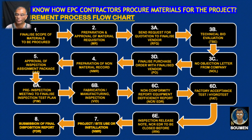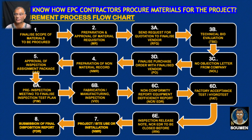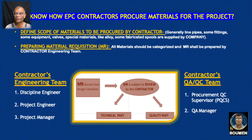The documentation is still open with the company vendor department. The contractor's Procurement Quality Control Supervisor (PQCS) must submit the Final Disposition Report (FDR). This FDR includes all NMR documents at the final stage, signed by all parties. Then the full procurement of this material — quality-wise and construction-wise — is completed and ready for site use. This was a total flow chart overview.